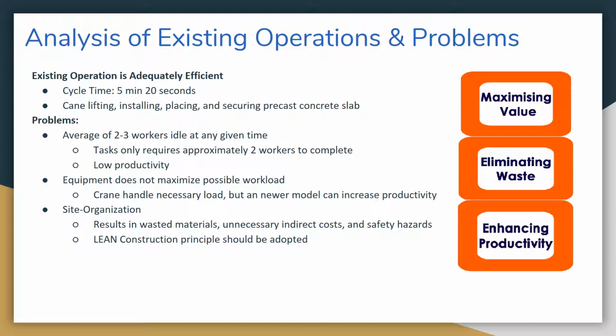Similarly, the current equipment, while providing an efficient cycle time, is providing minimum work. The crane used meets the requirement of lifting and transporting the concrete slabs and provides a steady cycle time. However, to increase productivity and reduce the amount of cycles, equipment substitutions can be implemented.